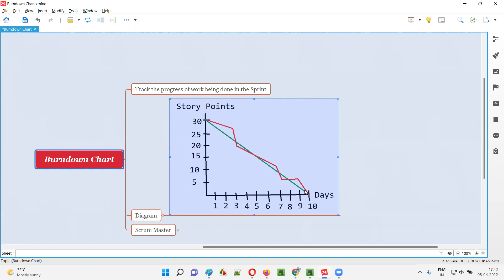Does work happen ideally as shown in the green line? No — it will not happen in real time. Sometimes the team will be behind, sometimes ahead. The red line shows the actual work being done — how story points are actually completed over the sprint's 10 working days. For example, by the end of three days, ideally 8 points should be completed, but the team may have only completed 4 points, lagging behind.